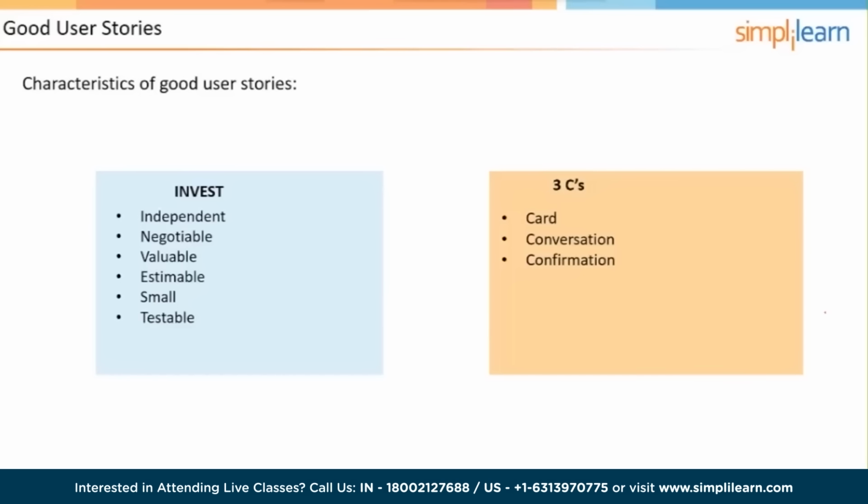I stands for independent. Independent, meaning that each user story stands on its own. When we're doing Scrum, you don't do a user story that won't result in working software. We just talked about the description of user stories, right? So it's a user that needs some kind of functionality for some kind of a reason, and they're all independent. Will they work together? Of course they'll work together if that's a necessity, but if you developed a login screen, you could demonstrate working software for the login screen. There might be another user story that has to do with displaying the catalog and being able to flag or select items that you want to purchase. But there'd be working software for that. Would they work together? Yes, but each user story would complete or result in some kind of working software, and they have to be independent.